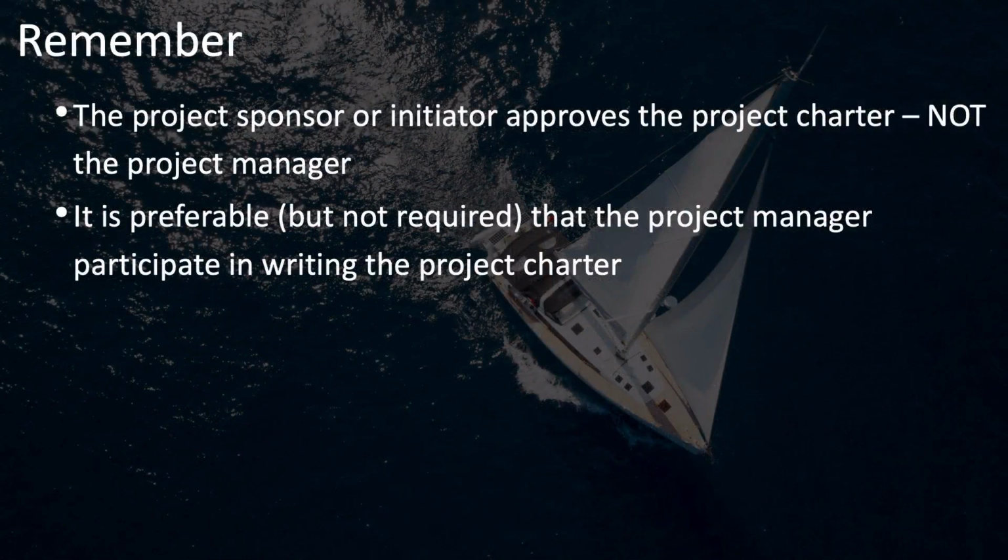Remember that although it's both common and preferable that the project manager participate in the writing of the project charter, the project manager is not the one who approves the project charter. All of this work that you do has to be reviewed and approved by the project sponsor for the project charter to be valid.